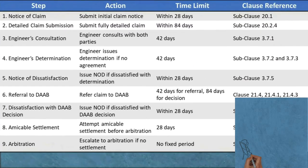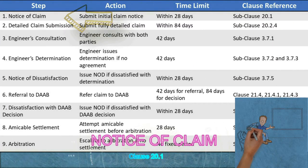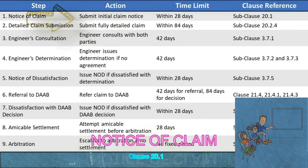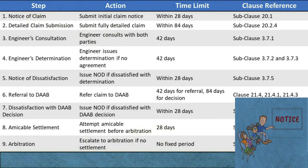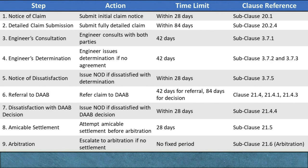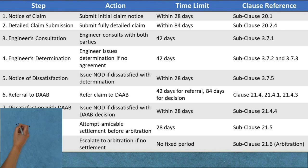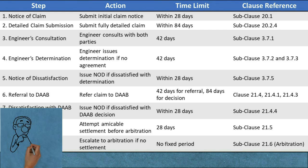Step 1: Notice of Claim (Subclause 20.1). Action: The claiming party, typically the contractor, must issue a notice of claim to the engineer. This notice should clearly identify the event or circumstance giving rise to the claim, detailing the facts that justify why the contractor believes an entitlement exists.